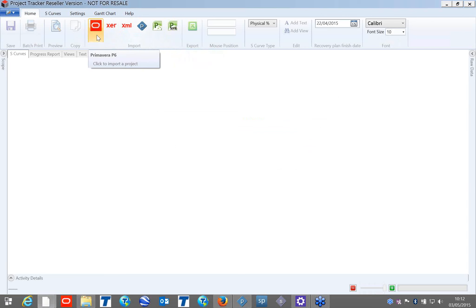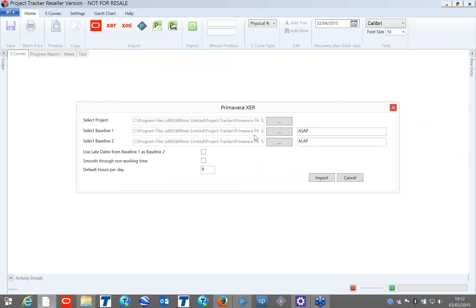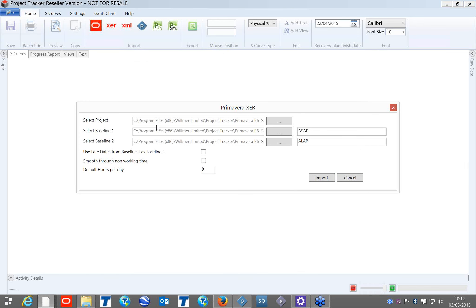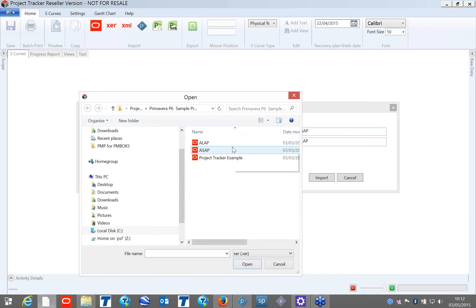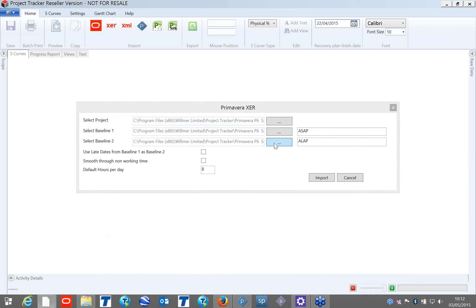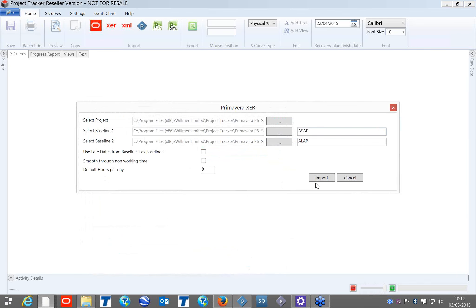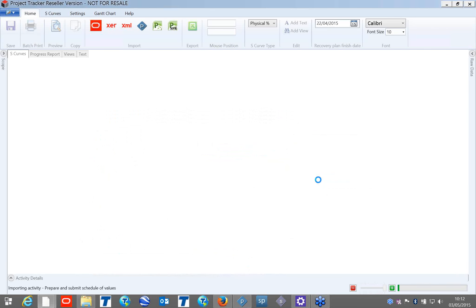Today I'm going to start with a Primavera project in XCR format — just a sample project which you can also practice with from your installation files. You can find the Project Tracker example there. We can set up two baselines to compare. In this case, I'm adding an as-soon-as-possible baseline and a second baseline, so I can import these baselines along with the project schedule.